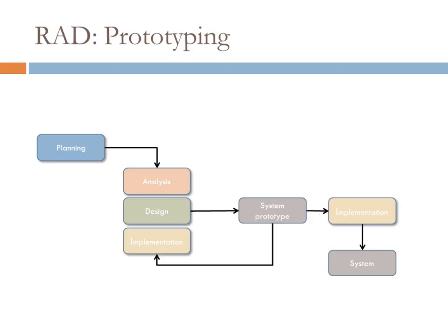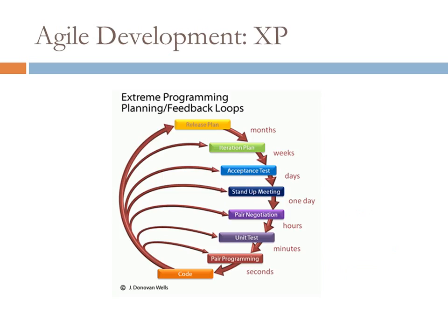I think throwaway prototyping is another one, where you decouple this from the implementation. You use this to come up with a mockup of how the system would work, but then once you're okay with that, you engage in separate design of the actual system itself and implementation.